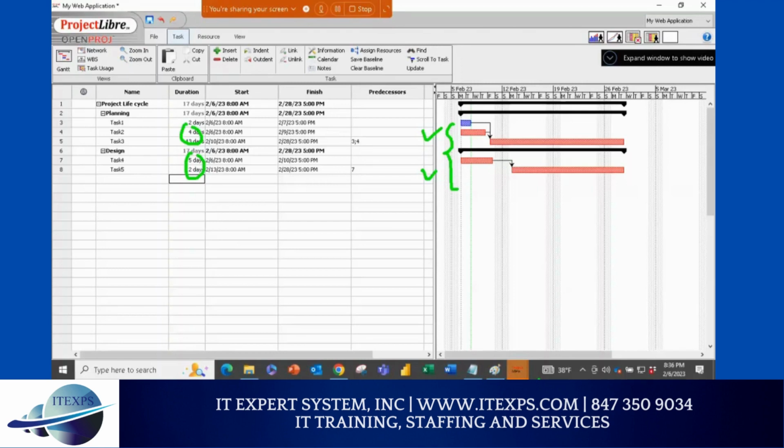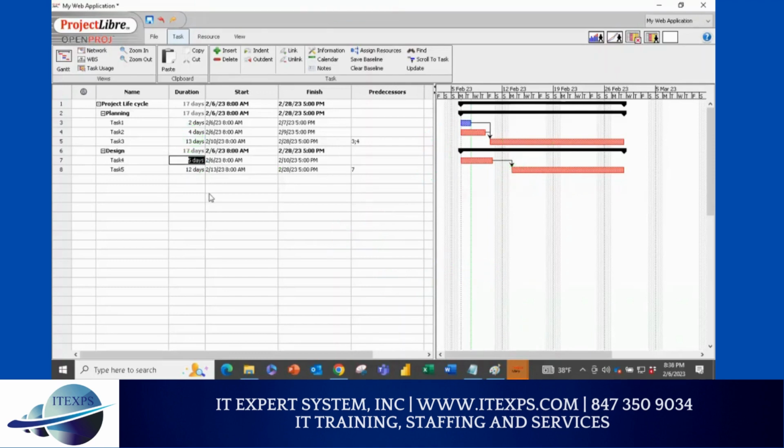So a good manager sees that these two activities are identical. They are taking around 17 days, right? So what can you do, good manager, listen carefully. There is one thing called critical path, which is back to back, which looks a lot more artificial. So they do critical chain. A good manager will do critical chain. They will add a buffer activity somewhere. Buffer activity. So for example, here it's a 5, but they will say it's 7 days.